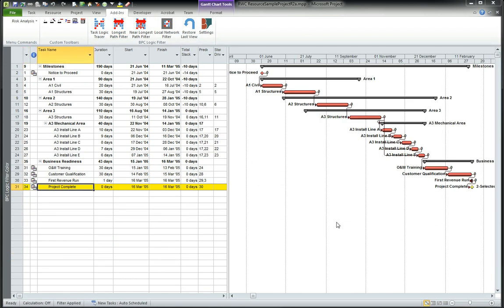We get a filter that just shows the longest path from the initial task in the project to the final task in the project. And it's all filtered to show only those tasks.